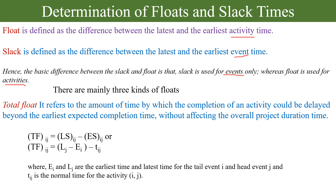The first one is total float. It refers to the amount of time by which the completion of an activity could be delayed behind the earliest expected completion time without affecting the overall project duration. Mathematically, total float Tf equals Ls minus Es, the difference between the latest start time and the earliest start time. One more formula: Tf equals Lj minus Ei minus Tij, where Lj is the latest time at head event j, and Ei is the earliest time at tail event i.